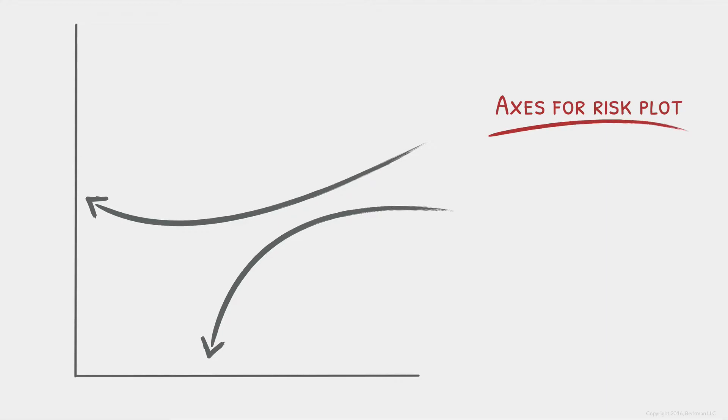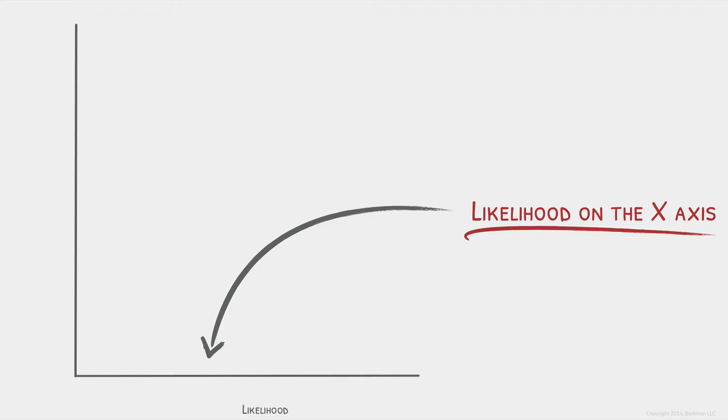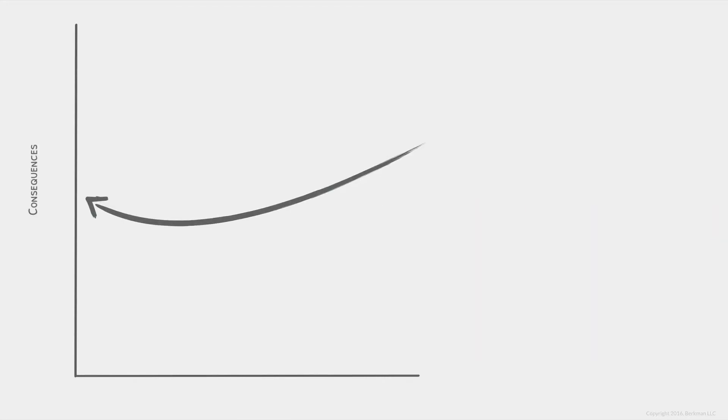Label the x-axis likelihood. This will accommodate our likelihood scale we saw earlier. Label the y-axis consequences. This will accommodate our consequences scale.